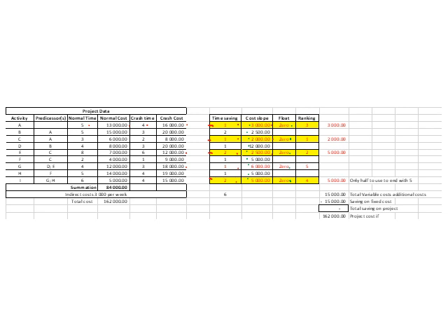Okay, so from your cost slope you rank your items. Item C has the least cost, so it's ranked number 1. Item E is ranked second because it has the second lowest cost slope, and then rank number 3 is your item A with 3,000.